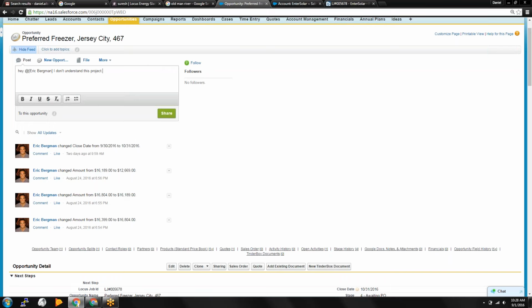The sales rep, especially when the project is still open and hasn't closed, is responsible for making sure the opportunity of record is accurate. Once that opportunity is accurate, only then will the engineer work on it from a design perspective, because what we want to avoid is the sales rep putting in only half the information, then the engineer begins to work on it and notices there's an issue, and then there's a lot of back and forth and a lot of wasted time.